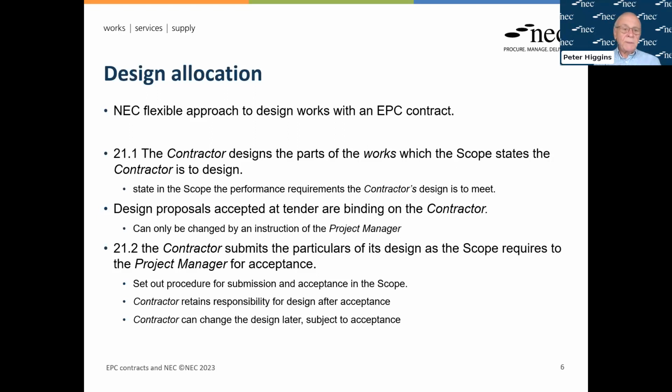Now, the next point on design is that if you've got design carried out during the contract, the contractor's going to submit some details of that to the client and or the project manager actually, and get that agreed. So 21.2 deals with that by requiring submission of the particular design as the scope requires, sent to the project manager for acceptance. So again, the scope is there to set out what it is you want submitted.